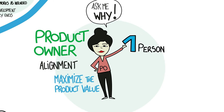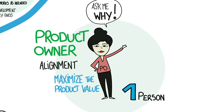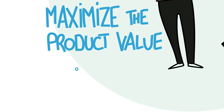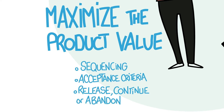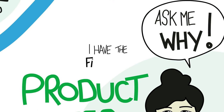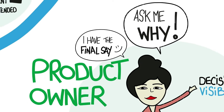Scrum solves the alignment problem by designating one person who is authorized to make decisions about the product: the product owner. Her decisions are visible in the content and sequencing of the product backlog and in the increments produced every sprint. These decisions include sequencing, acceptance criteria, and whether to release the product, continue development, or even abandon the effort. The product owner can decide what will be done first and can have final say on the definition of acceptance criteria and whether an item is done.